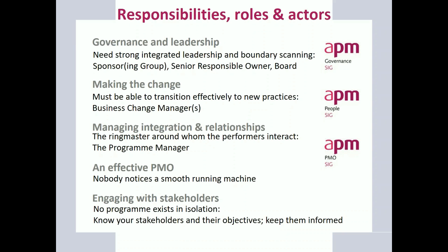One of the very interesting things in terms of the governance and leadership piece is where that PMO sits. In the Thames Tideway Tunnel, we made a command decision, or an executive decision, that the PMO, which many people would argue should sit under the program manager, should actually sit under the chief operating officer of the business.